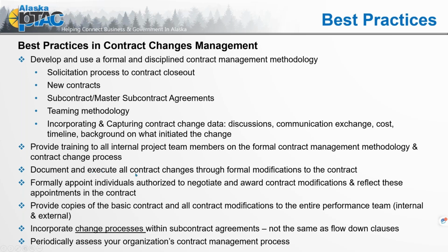We want to document and execute all contract changes through formal modifications to the contract. We really don't ideally want to wait until after the fact. Again, it happens, but we want to at least begin that conversation and keep it timely. You want to formally appoint individuals authorized to negotiate and award contract modifications and reflect these appointments in the contract.